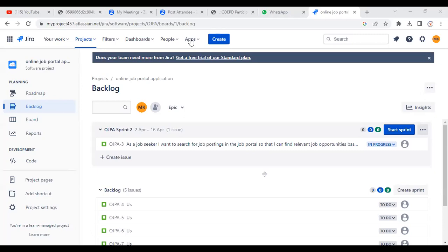Okay. So suppose in the first sprint, the features required to complete the criteria are not completed by the development team or the whole team. So it will move forward to the next sprint, I think. No, if it is not completed in the next sprint also, it will be pulled back to the product backlog, Naren. Depending on its priority, it will be pulled into a sprint again, second sprint, fourth sprint, all depending on the priority of that user story. So the estimated time we mentioned will vary because the completion time has changed. Again, the development team will estimate whatever time they have decided.